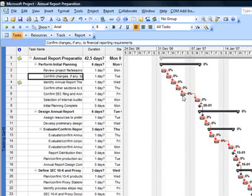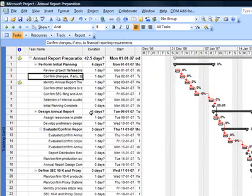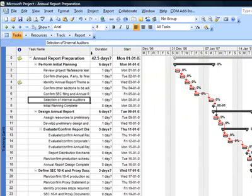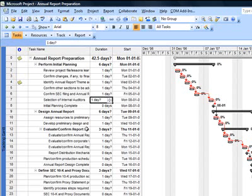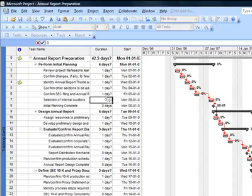To demonstrate it further, let's assume this activity called Selection of Internal Auditors was planned to take one day, but in real life it is not taking one day, it is taking maybe three days. So I come here and I change duration to three. Just observe carefully as to what happens in the Gantt chart.